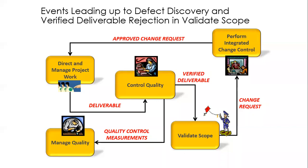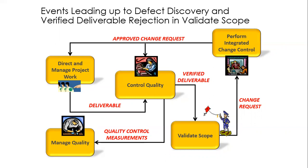At the end of all this, don't forget the feedback loop continues. Approved change requests will go back into control quality for the next go round. That takes us to the final scenario — events leading up to deliverable discovery, deliverable acceptance, and transition to the customer.